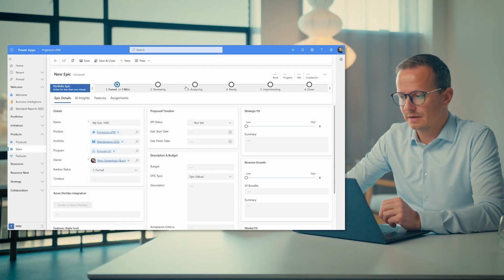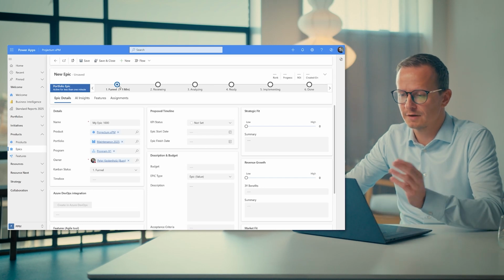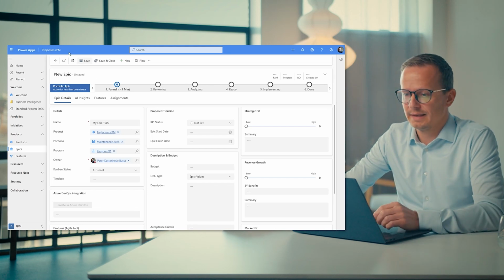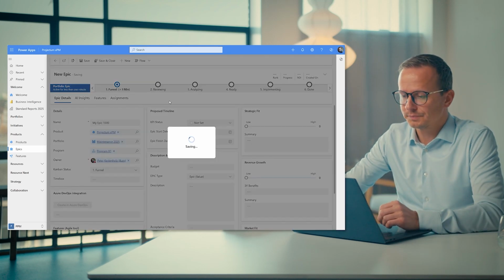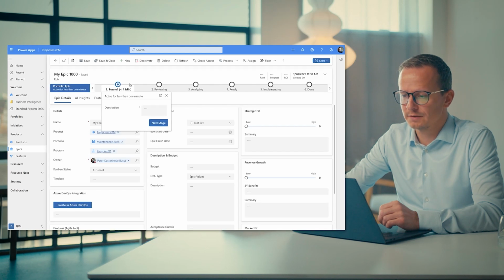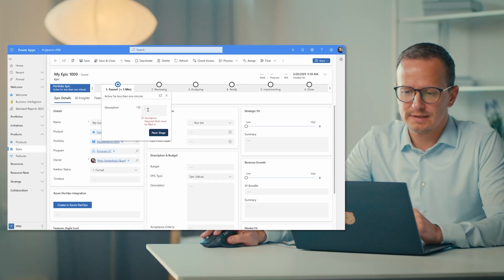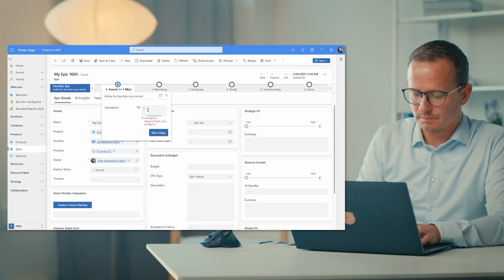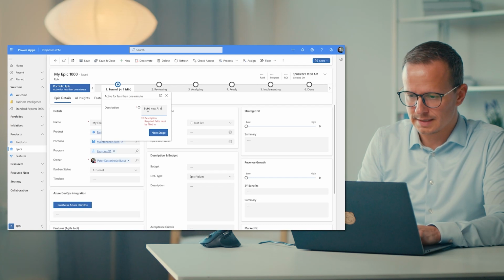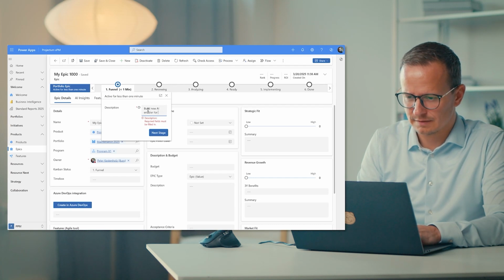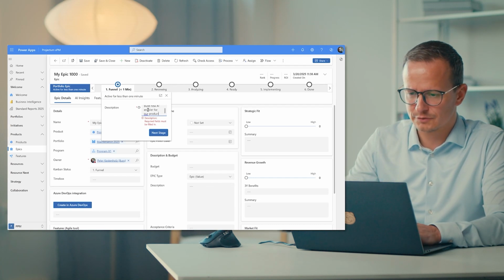Essentially, it's the same you see up here, where you have the governance or the process for the entire epic from funneling to being done. And if we just click Save right now, we can see that to progress from funnel to review, we need a description. So I can't move forward until we have the description in place. So I can write my description here: build new AI enabler for a product. That could be the epic description.